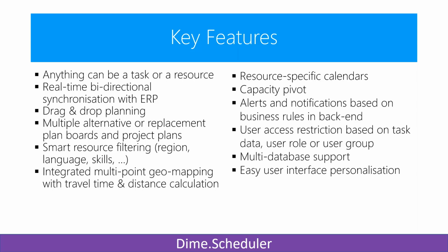Now, when planning these tasks on the plan board, you can use company-wide calendars, but you can also use resource-specific calendars or specific shifts in which people are working, morning shifts, evening shifts, night shifts. And the planner always has the ability to respect or to override those specific calendars. So you can actually enforce overtime if you want, just to make sure that a specific task is fully finished on a specific date, or to be sure that a project is not overrunning on time.